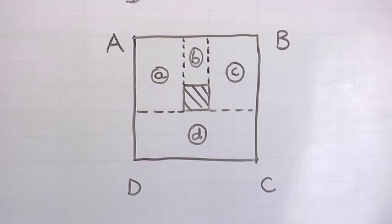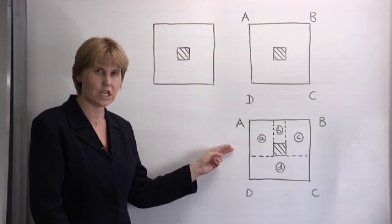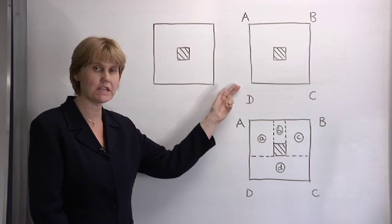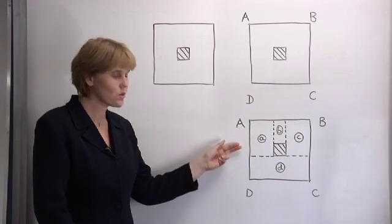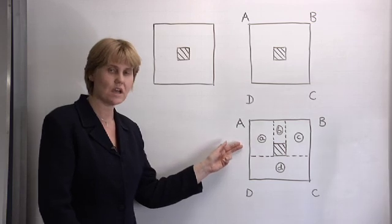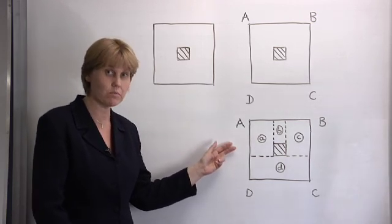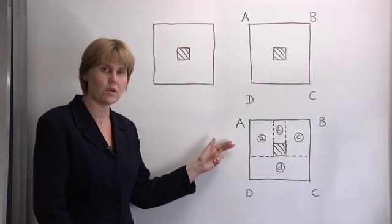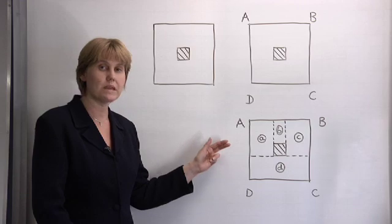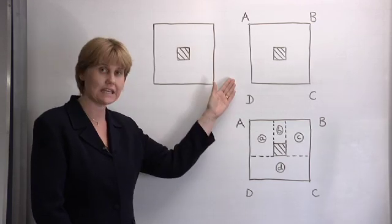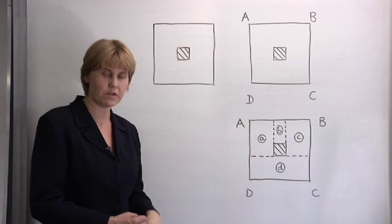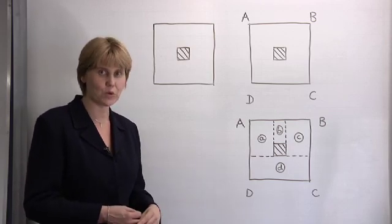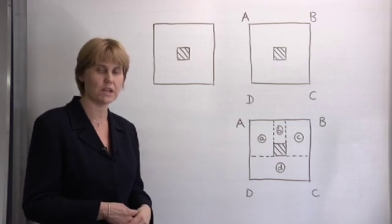Hopefully you can see that this piecemeal approach is inefficient. We have four calculations compared to just two calculations when we measure overall and deduct. As a quantity surveyor every time we put pen to paper there is a likelihood of human error. It is also more time intensive. So as quantity surveyors we must strive to adopt techniques which simplify the process, are more time effective and also avoid the likelihood of human error.